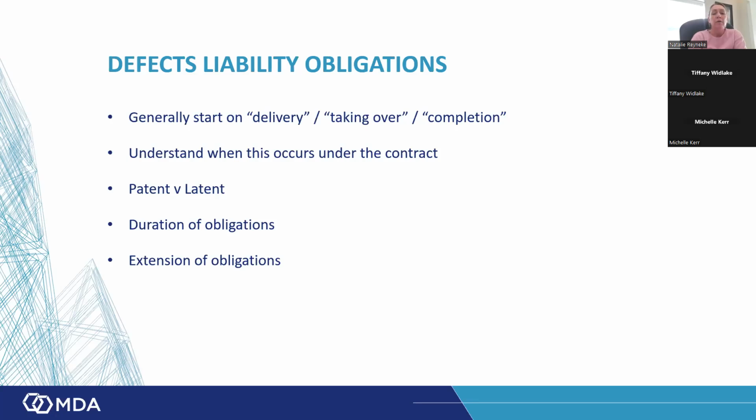And the employer is of the view that the defects liability of 365 days or whatever it is might commence on the date of issue of the final taking over certificate, but the contractor is of the view that each taking over certificate or each section will have its own 12 months defects liability period. So that's the one example that I can think of where issues have been created, in terms of when it starts and when it ends.